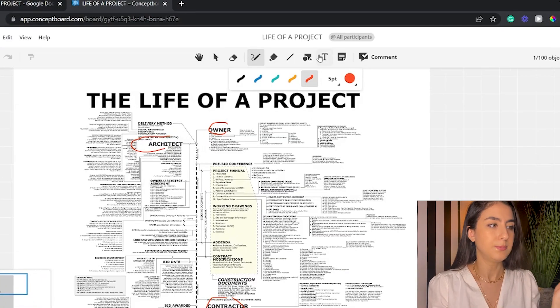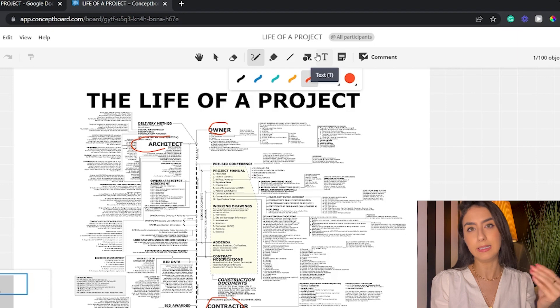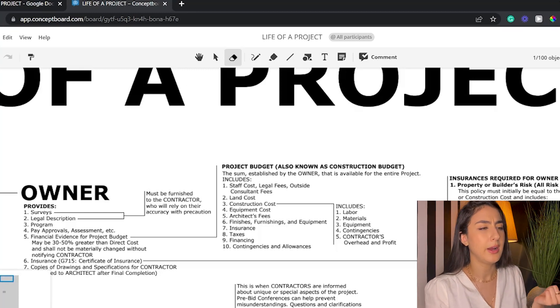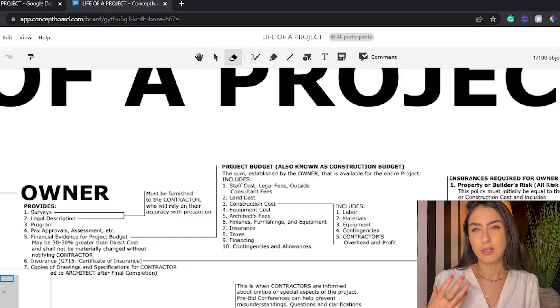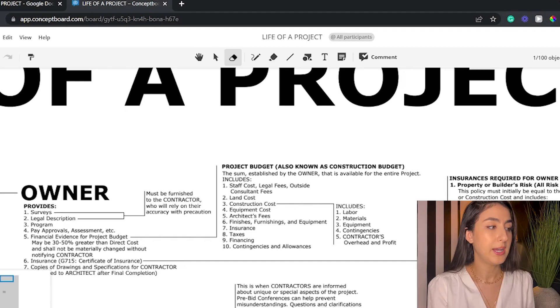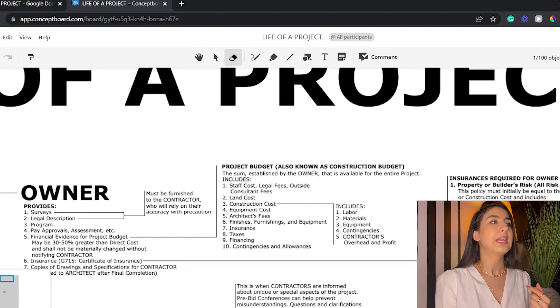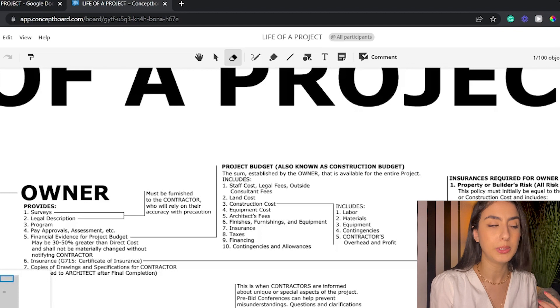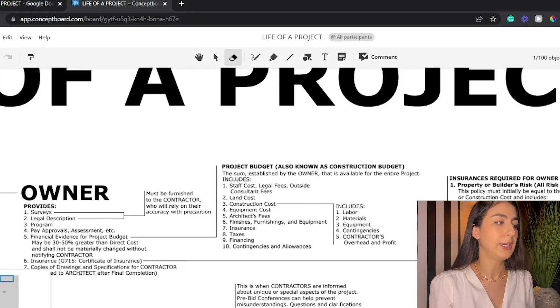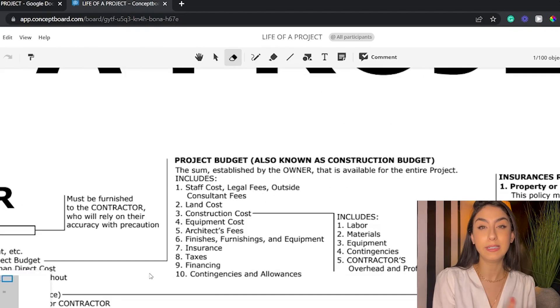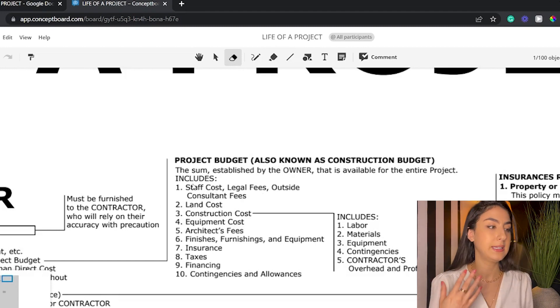Let's start with the owner, because they are the first person that gets the idea and the first to join the team. The owner provides anything to do with the land — they need to have land, provide surveys, hire surveyors, civil engineers, and geotechnical engineers to know what kind of soil they're working with. They also provide the legal description of the land, such as commercial or residential zoning, come up with a program — like do you want to build a hotel or a hospital — and then they have to show financial evidence, like a loan or cash in their account.